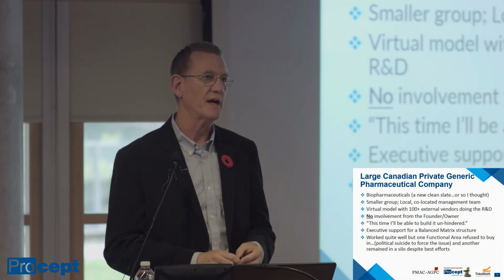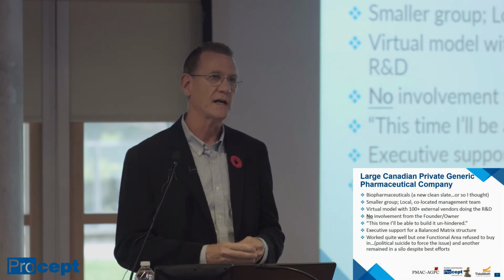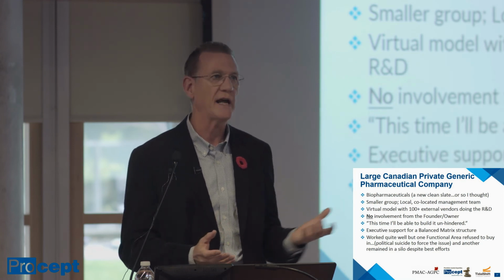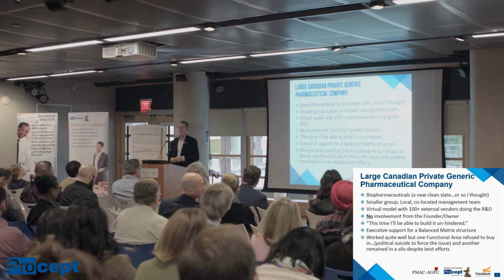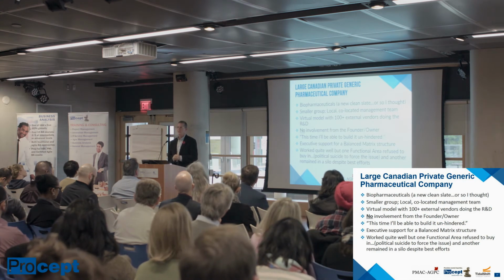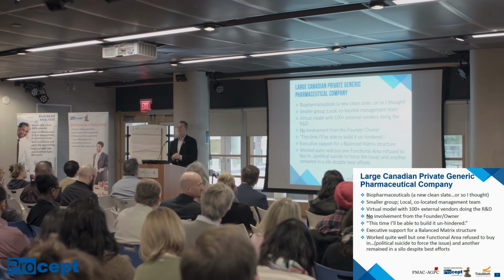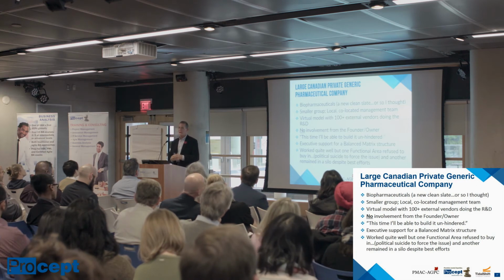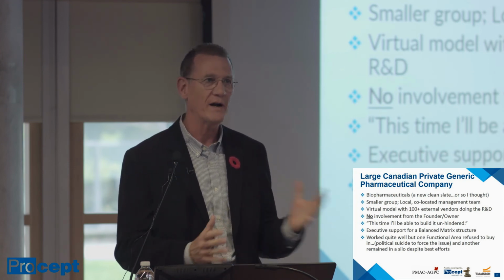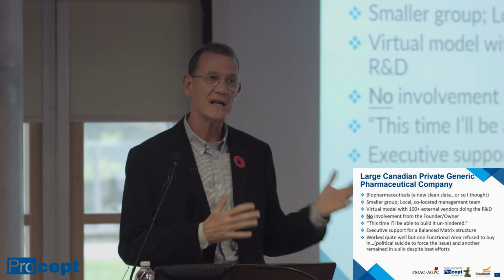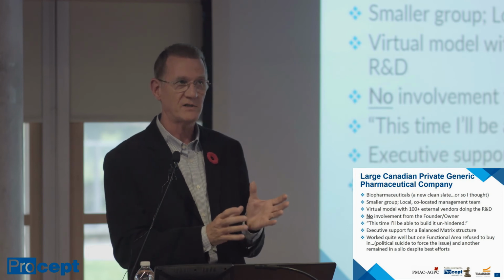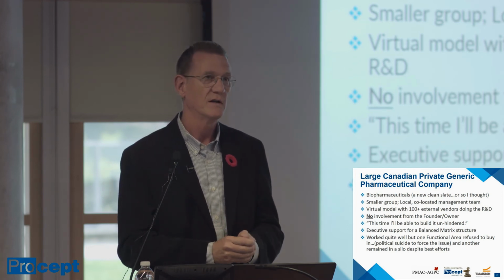With respect to those people that stay in their silos, I understand why in an R&D environment. Part of the reason is because in research and development, you don't know what you're going to get, and you don't know how long it's going to take. So when the project management person comes along and says, hey, I got to update my Gantt chart, they go, well, whatever. I'm not telling you how long it's going to take because I don't know. Okay, well, that's fine. Can you guess? Can we put something in the Gantt that's going to take maybe 3 months to do this or whatever it is? These are long timelines, right? These are not days and weeks. These are months and years. But we need to put something in because everybody else is depending on some kind of date to know when they should start to do things. All right, we'll put that.